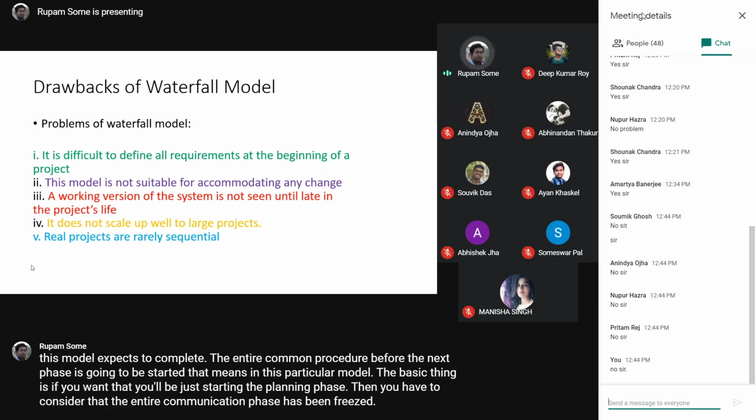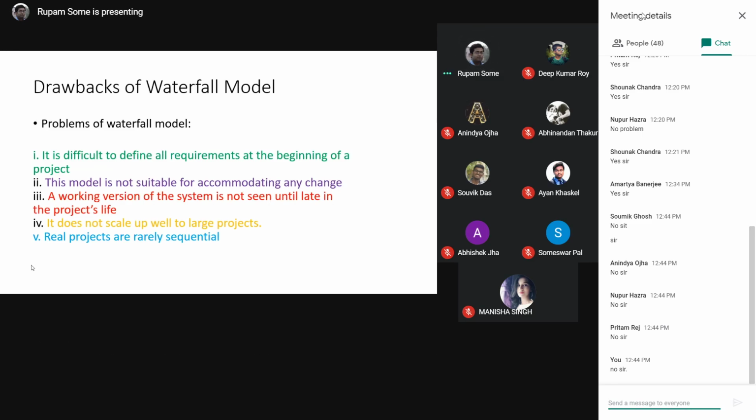So you have to ask the person again and again to clarify the requirements. If you have solid expertise running an existing manual system, then it is easier for you to clarify most of the requirements in a single sitting, because you have expertise running a similar kind of system. You are manually running it. In most cases, in a single sitting, most clients or customers will not be in a position to clarify most of the requirements. So you will simply be stuck in phase number one.